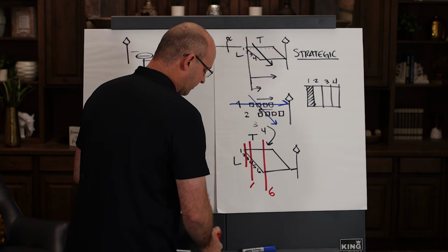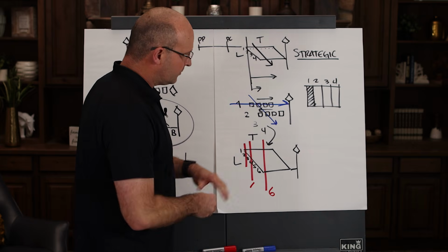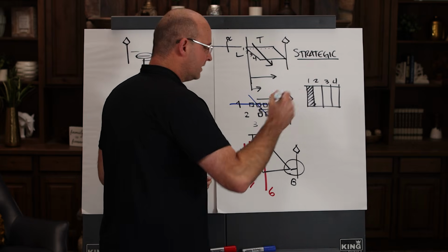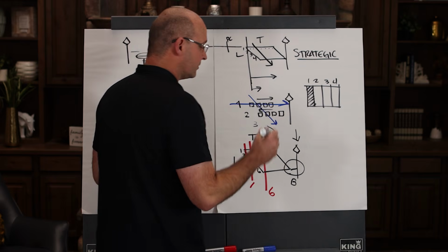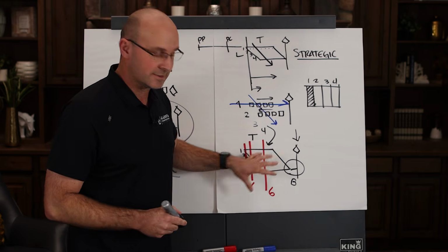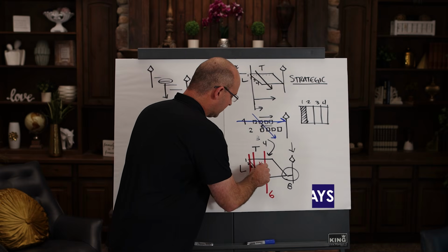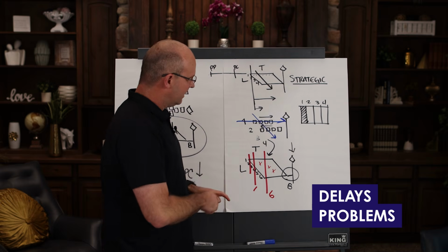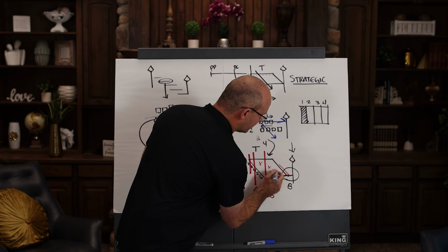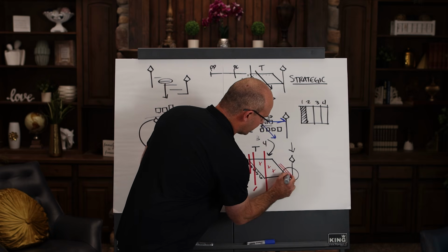Now, a couple things that I want to really encourage. This is where you're tracking the use of buffers at the end. This is where you're tracking your completion to the milestone. And this is where you're looking at this entire thing as a system. Oh, this is good. You will hit delays and problems. This is the view where you say, okay, how does that impact the end? Do we need to dip into buffers? This is how it impacts.